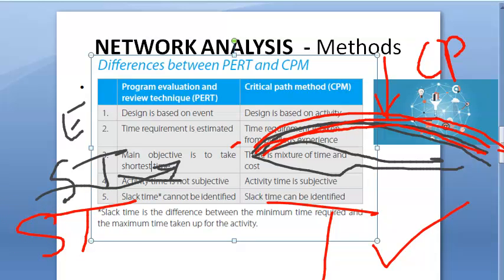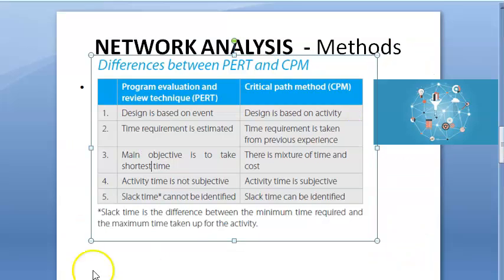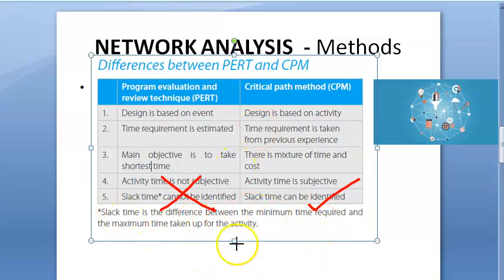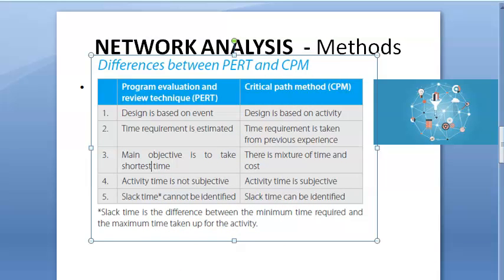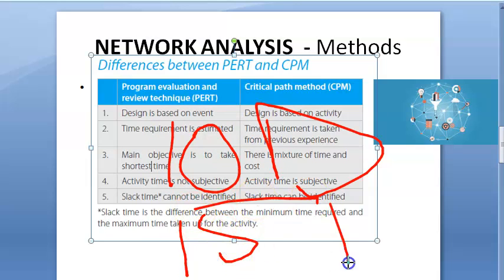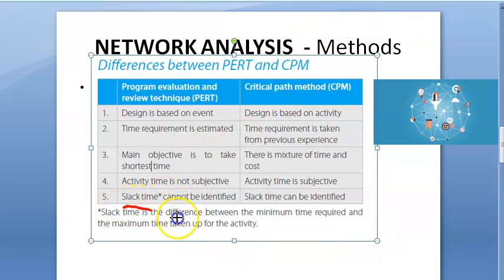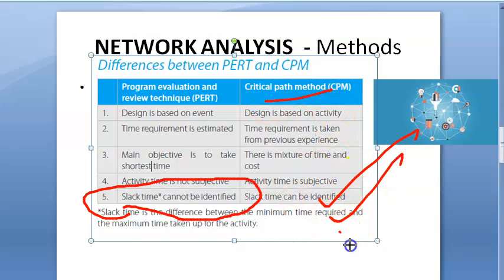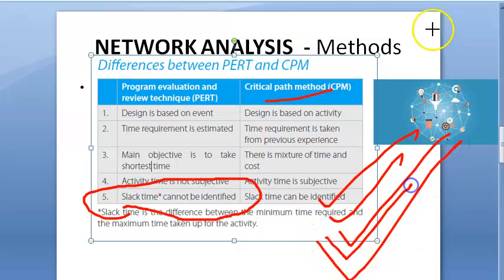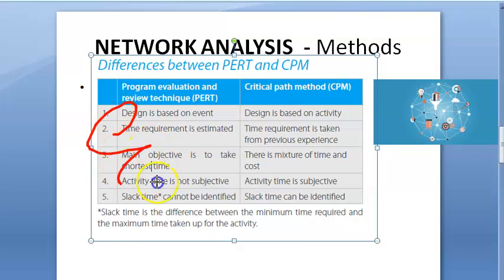Slack time cannot be identified in PERT, but slack time can be identified in CPM. Slack time is the difference between the minimum time required and the maximum time taken for an activity. For example, if you need at least 10 days minimum and 15 days maximum, then 5 days is the slack time. In CPM, since you know the time from previous experience, you can determine the slack time.